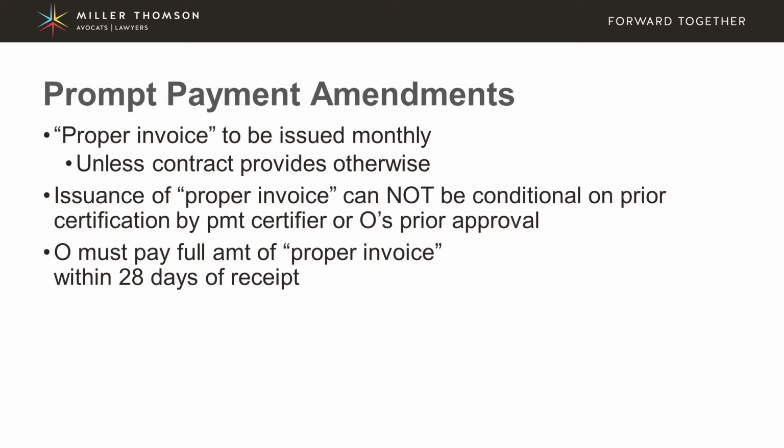So an owner may want to try to avoid those obligations by attaching conditions to what constitutes the proper invoice or what creates the trigger point for the owner's obligations. However, under the amendments to the Lien Act, or to the Construction Act, I should say, that is not allowed. So you can't put into your contract that the proper invoice has to be approved in advance by a payment certifier,